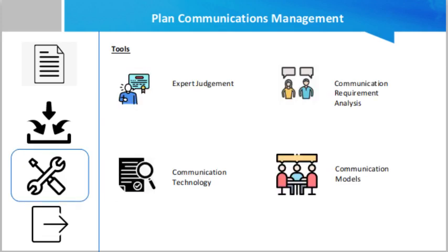Now the tools. The first tool is expert judgment. Expertise should be considered from individuals or groups with specialized knowledge or training. Then the communication technology and communication requirement analysis. Friend, communication requirement analysis is basically the analysis of communication requirements to determine the information needs of the project stakeholders.